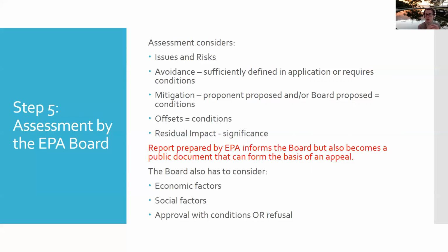So obviously with these guys, they had to do a construction management plan. They had to tell people how they're going to manage the construction. They had that big monitoring program to work on, from maintaining the current one, because the wastewater treatment plant was still operating while they built the new one. You can't just turn off a treatment plant for 12 months while you're doing it up. So they actually had to operate and transition the system while they were still operating.